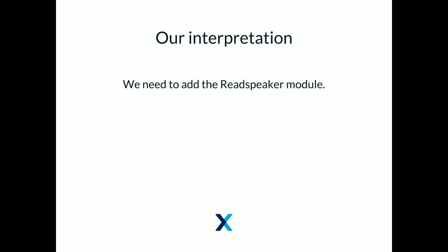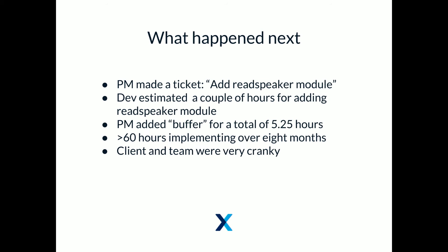And if you can already spot the problem, then well done. We said, oh, okay, we need to add the ReadSpeaker module. There's a module for that. Install the module. Turn it on. What could go wrong? But obviously, that's not what happened. The actual ticket that tracked this request was called Add ReadSpeaker Module. So the developer estimated adding the ReadSpeaker Module, and came up with a massive total of 5.25 hours, which is so precise, but so wrong. And in the end, we spent over 60 hours implementing this request, and nobody was happy about it.